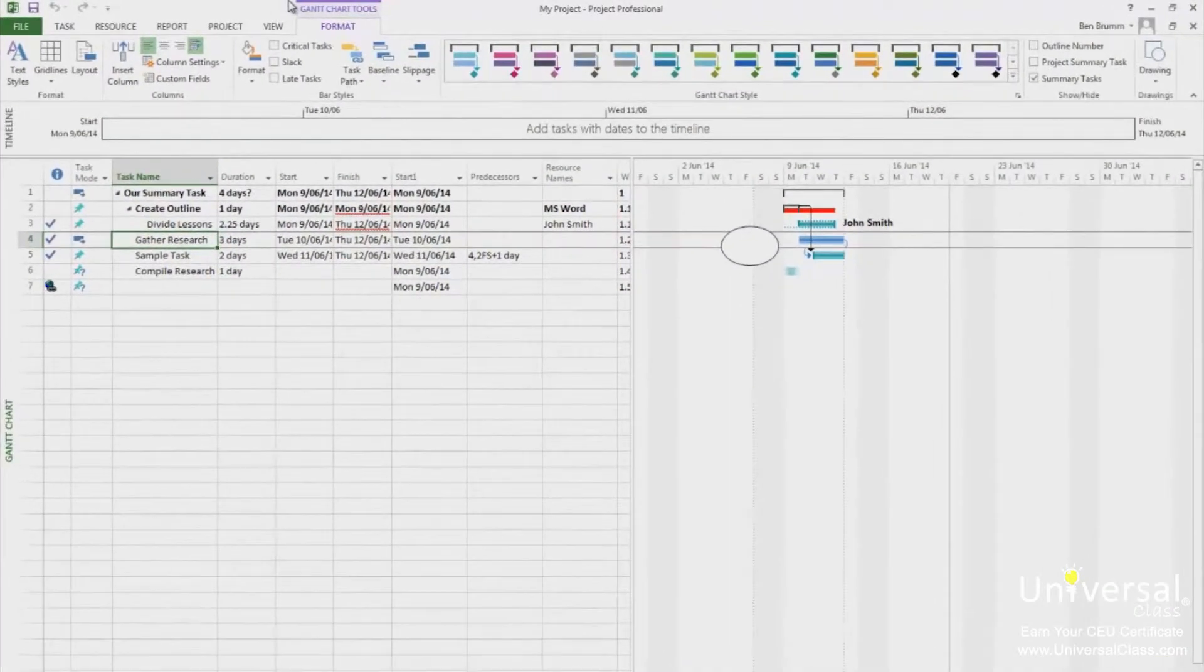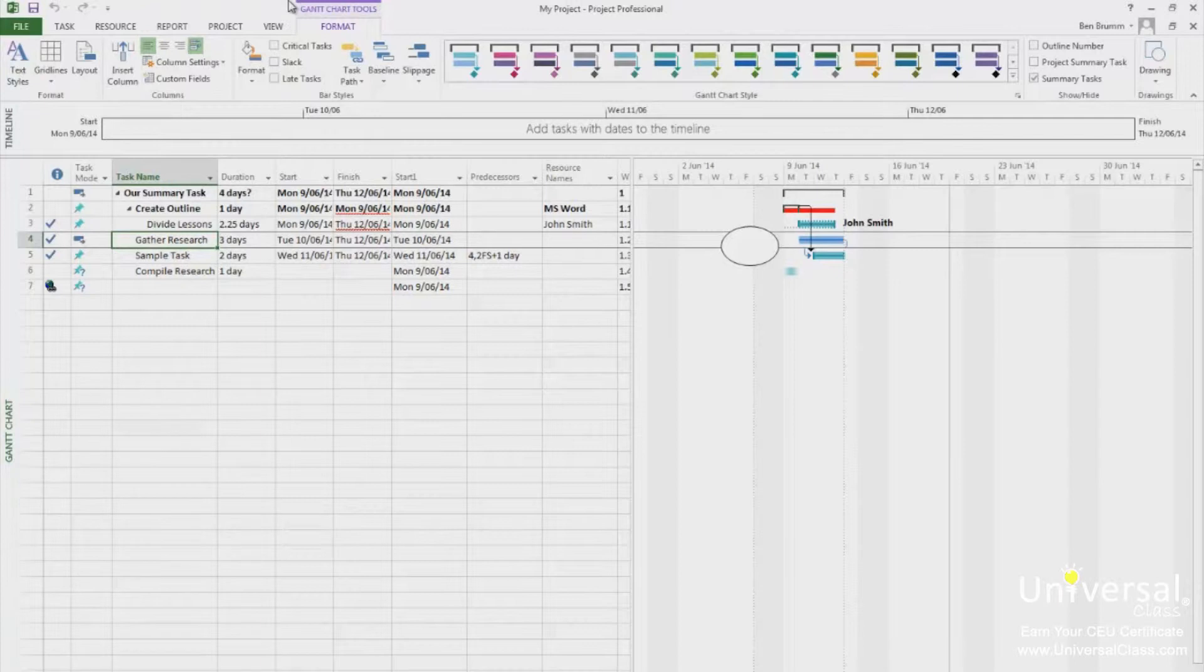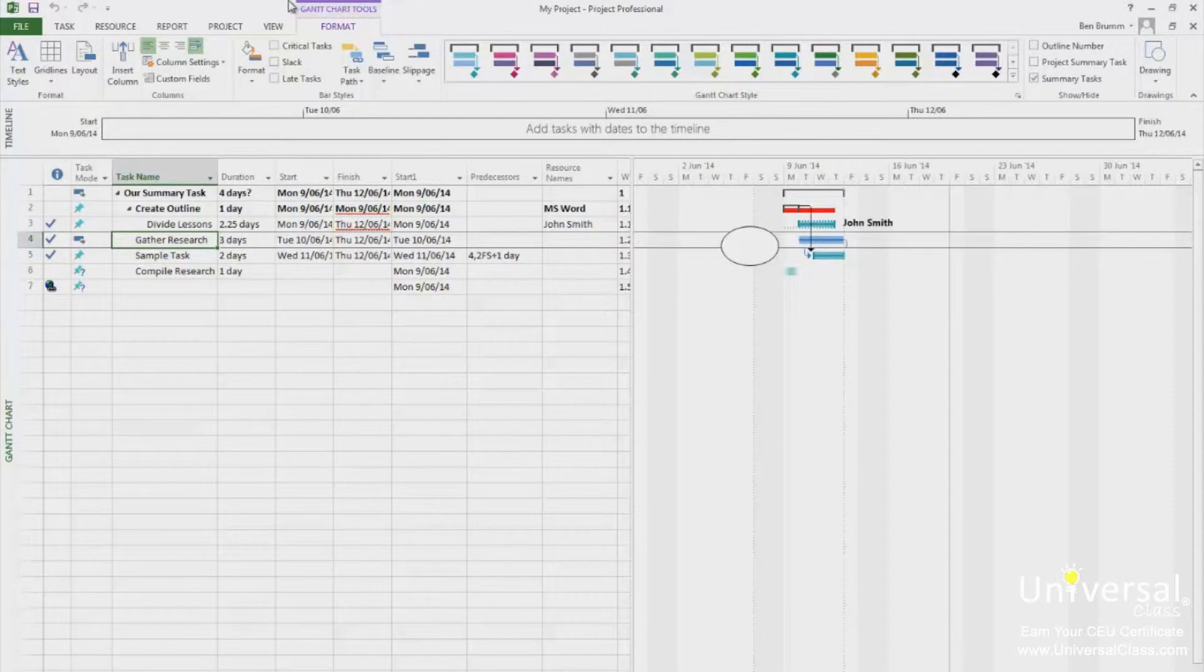When you want to track the progress on your project, it is important to first enter a status date. Project will, by default, use the time and date settings on your computer. However, let's say that you want to track the project status through the last day of the month, then enter the date. You can also use update tasks along with it, because you can mark tasks complete up through that date.